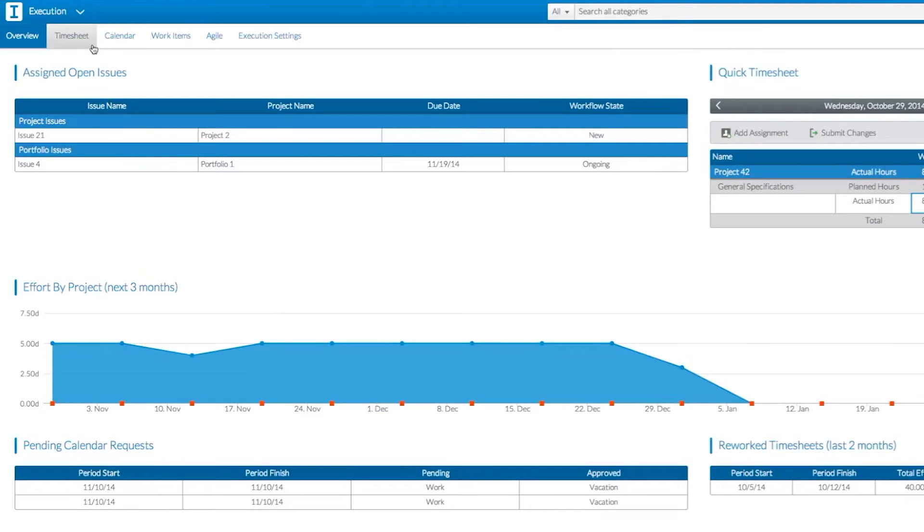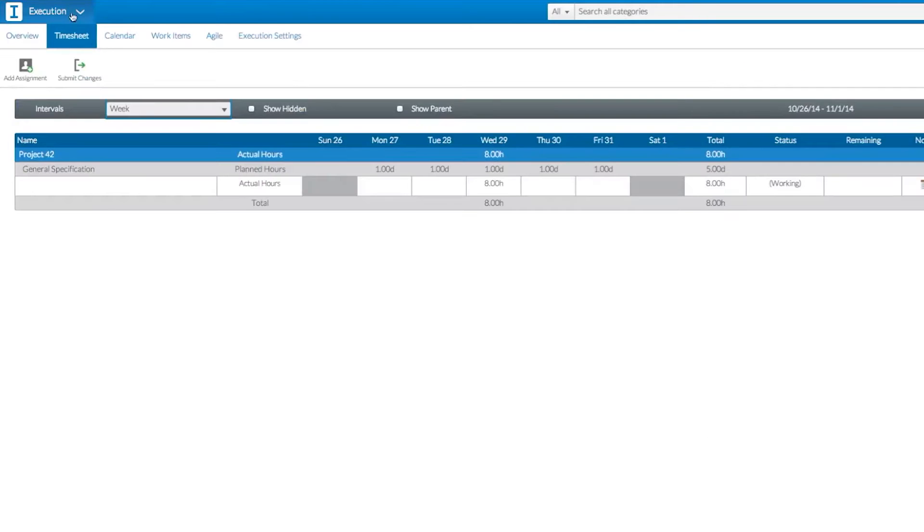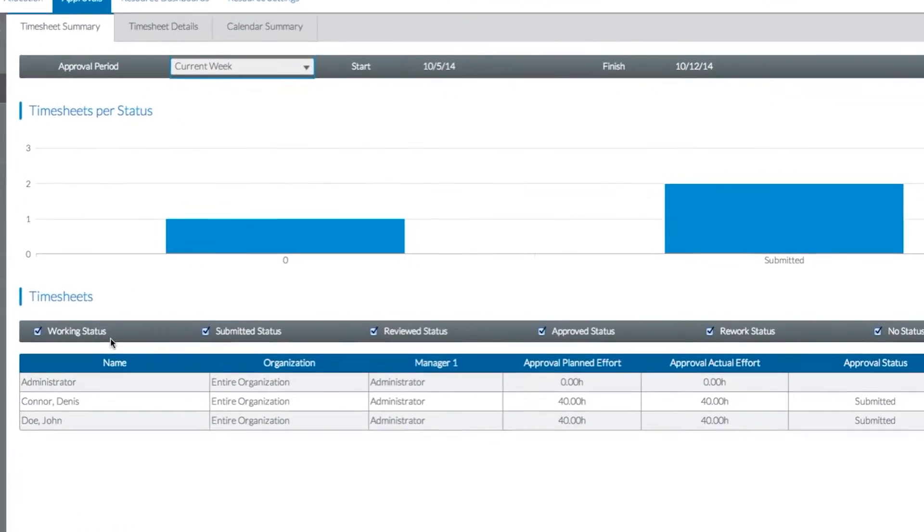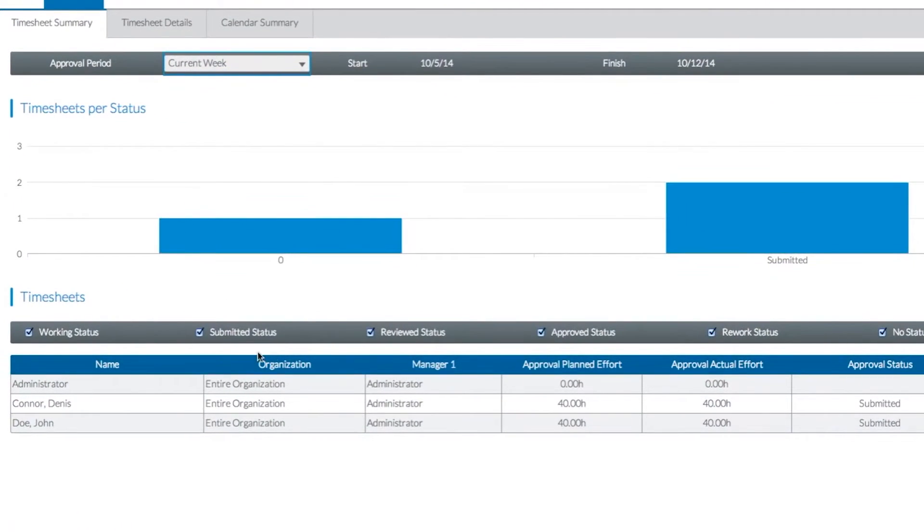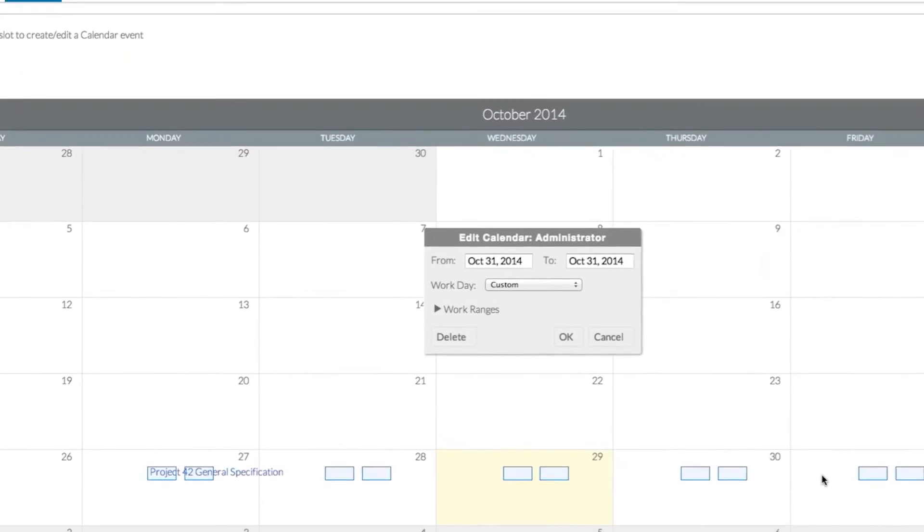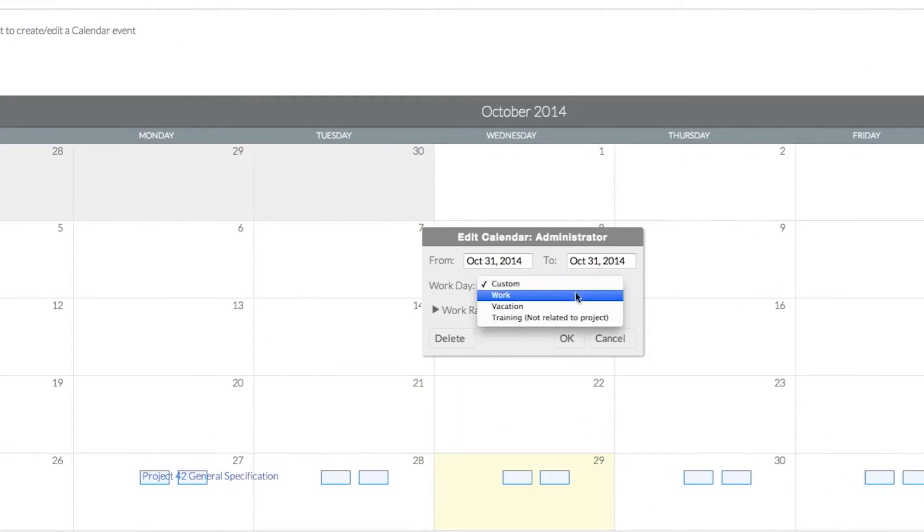Under the Execution extension, you can enter time worked on projects so that data is paired with specific projects. This allows management to evaluate resources committed to projects. Users can also enter absences and request time off.